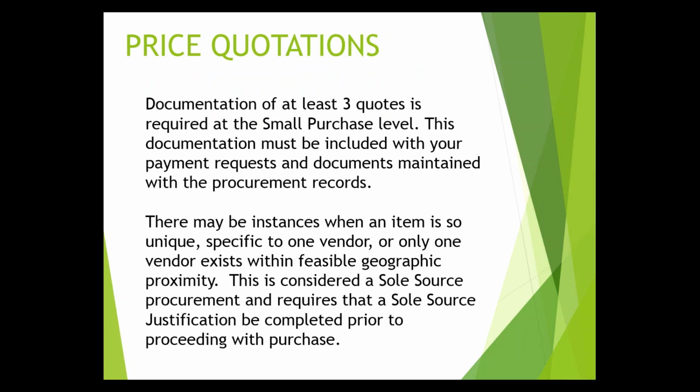Okay, so I'm going to just go over this really quickly. Price quotations. The documentation of at least 3 quotes is required at the small purchase level. Documentation is a key word. I'm going to stress that throughout this webinar. There needs to be a piece of paper, or something that you pull up on your computer screen, that shows, here is what I've done. I did it, and then I checked it off. This documentation must be included with your payment requests and documents maintained with your procurement records.